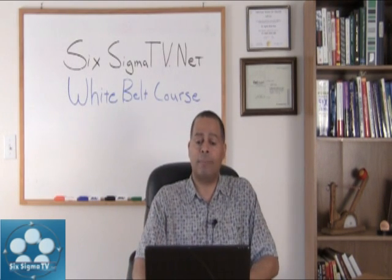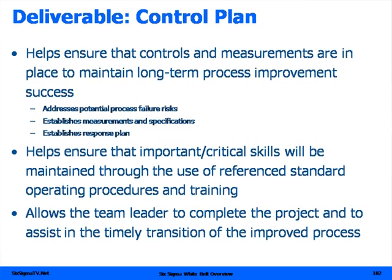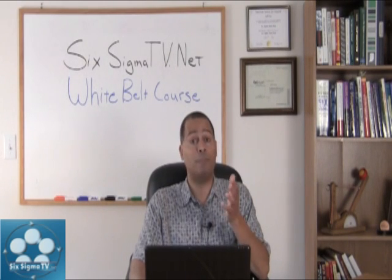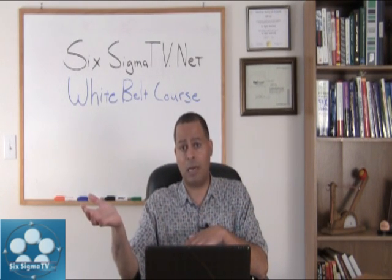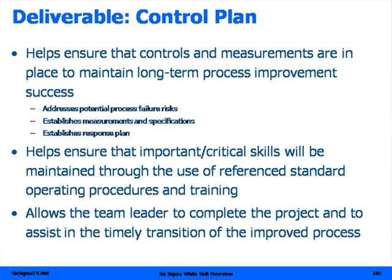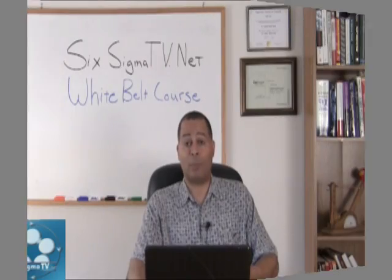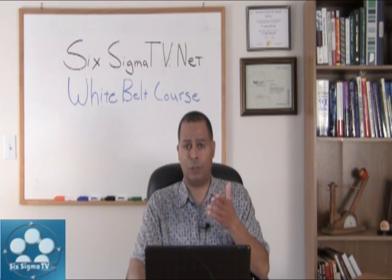You're going to control the process, look at the benefits, and then implement that new process. The deliverables of the control plan: it helps ensure that controls and measurements are in place to maintain the long-term process improvement, it addresses any potential failures, your measurements and specifications that you're going to monitor, and establishes a response plan in case your process starts to stray again. It helps ensure that critical skills will be maintained through the use of your standard referencing and operating procedures, and allows team leaders to complete the project and assist in a timely transition of the improved process. We have that template up at the website, SixSigmaTV.net — you can pull those down to use in your projects.